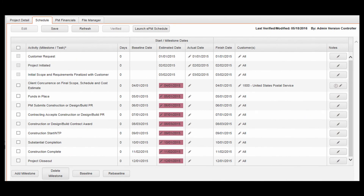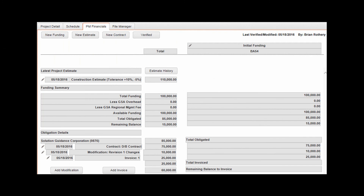The next required update is to verify the project schedule. Navigate to the Schedule tab, review the scheduled data, and if correct, click the Verified button in the toolbar. Finally, the PM Financials must be verified. Navigate to the PM Financials tab and review the financial data. If correct, click the Verified button in the toolbar.